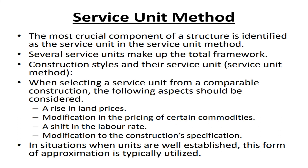Service unit method: The most crucial component of a structure is identified as the service unit in the service unit method. Several service units make up the total framework. When selecting a service unit from a comparable construction, the following aspects should be considered: a rise in land prices, modification in the pricing of certain commodities, a shift in the labor rate, and modification to the construction specification. In situations where units are well established, this form of approximation is typically utilized.